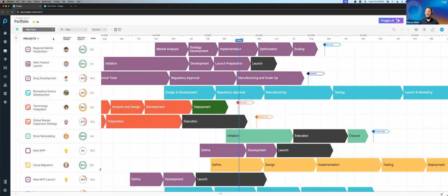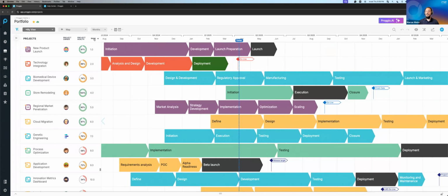Further, I can sort by any metadata field, like my rank, and now execute on my projects in this fashion. We see projects listed out line by line on the left-hand side, of course, with its respective metadata like the owner, the name, even the health, which is showing us if we're on track for today's date. So in simple terms, if we should have 10 days of work completed, but we're only at 5, it would give us a 50% health.